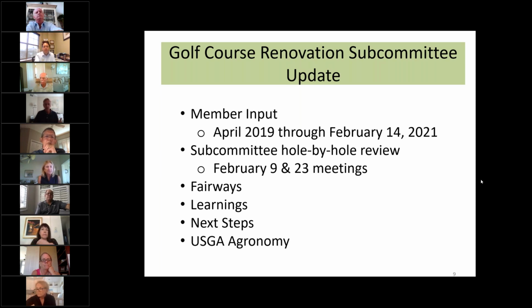We do reserve for the wooden bulkheads. We do reserve for those. It's our understanding right now that the cost of what they call stacked rock is around 15 to 20% more than the bulkheads. We have some stacked rock on the golf course right now. If you think about the 15th tee, back by the 1 and 2 tees, as you're driving towards the restroom, that whole wall there is stacked rock. And it's nice, it's appealing, it gets moldy. I guess it has a lifetime warranty.